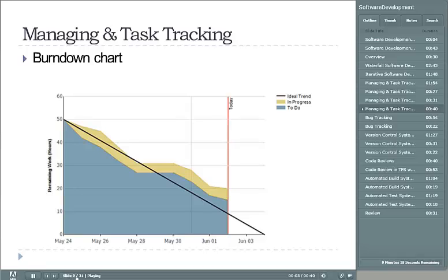Another visual way of representing the progress of a team is through a burndown chart. The burndown chart shows the total amount of remaining work on the vertical axis and the current day on the horizontal axis. So as long as developers are doing what they should be, the amount of work will decrease as each day goes on. How accurate your estimates are for each task is also important. If you have poor estimates and underestimate how long each task will take, you'll see that the burndown chart doesn't decrease as quickly as it should. The goal is always to be at 0 remaining work hours when the iteration completes.